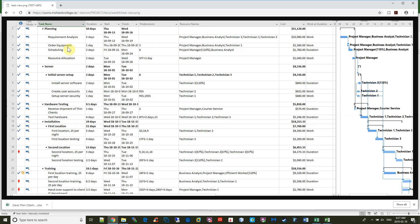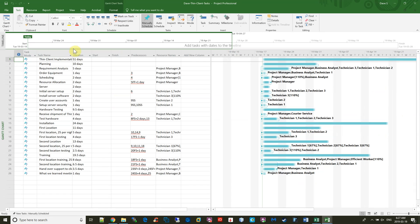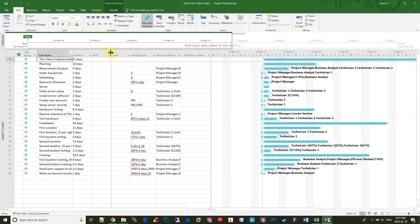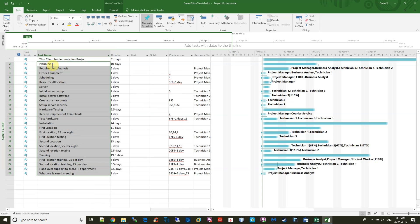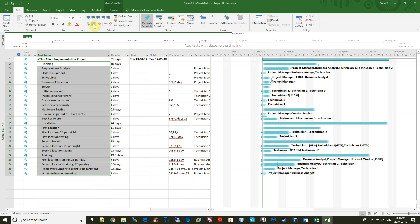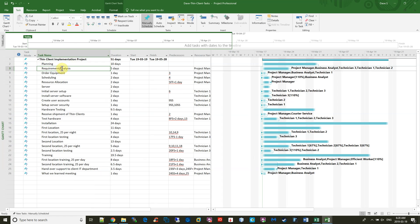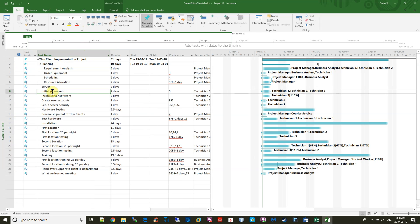So I'm going to begin and create the summary tasks. This first one is a summary of the entire project, so I'm just going to take all of the items and indent them over one indent. And then the planning items are right here, and I'm just going to indent those. The server items are right here, and I'm going to indent those.